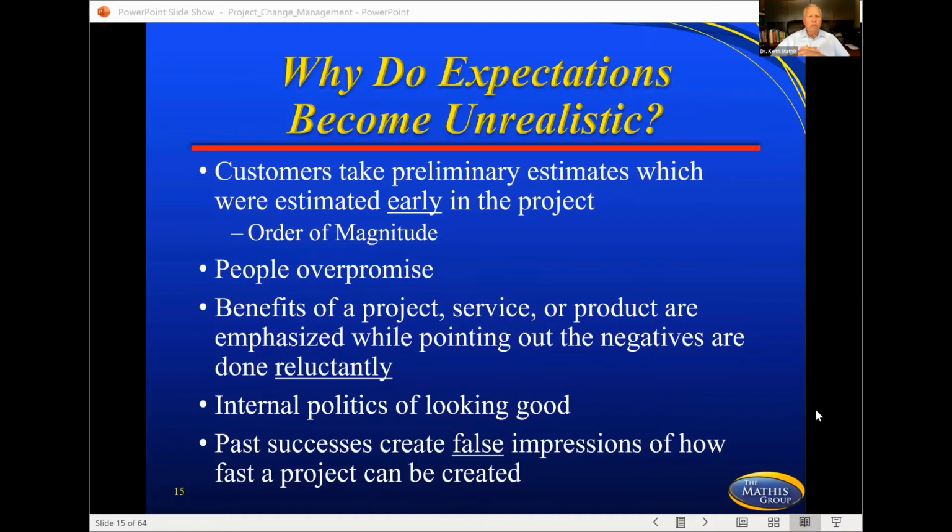Sometimes you don't even know what you don't know. And so you're asking those questions up front. So you get an order of magnitude, which could be plus or minus 75% off. And then over time, you get that narrowed down towards somewhere around 10 to 15% on budget, and that's called your definitive estimate. That's what you're shooting for to run the project with.